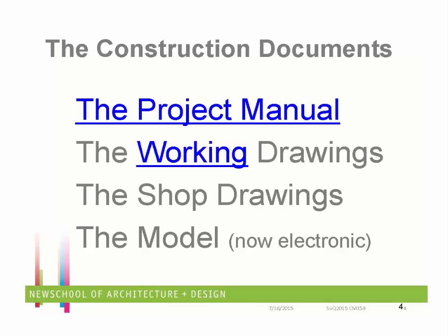That's how shop drawings get made. That's why when I used to say approved, I was on the hook for it. That's why it now says reviewed for compliance. So if your work is failing, your insurance is going to cover it. Now, if I haven't checked the dimensions properly, that's going to fall back to me. But still, I'm not approving your work. I'm reviewing it to make sure that it complies with the requirements of the drawings. So it's really an interesting thing.